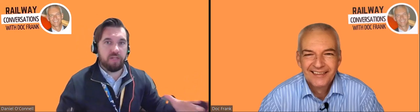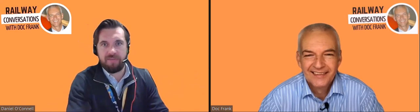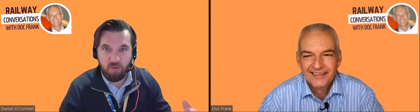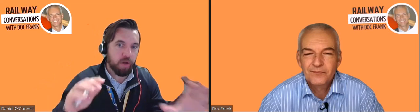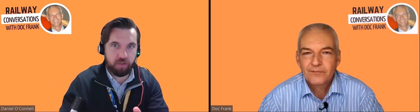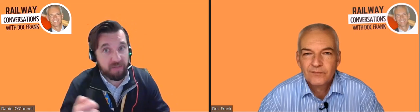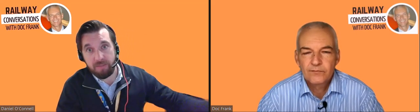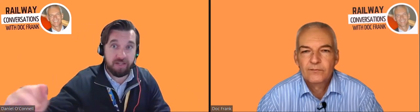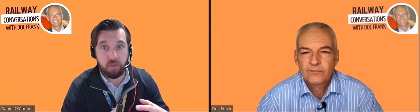So the way that we try to mitigate this in my mind would be Monday to Friday, we have 16 hours of, let's say, train testing, real train testing. We may get 10 or 11 hours of actual wheels rolling, so test time. However, the second 8 hours in my mind could be that function, running a train up and down. Friday evening, we put the trains to bed, we hand back to the construction and the maintenance works to be done. Likewise, on a Monday, they hand back to us.